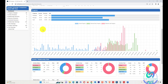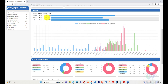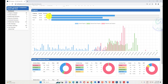Now I will look at the progress section to see what changes occurred between the two months. This is also useful for consultants to check what was achieved between the baseline and a recovery or revised schedule — you can compare your baseline versus recovery schedule changes. You can see here the schedule percent complete for current and previous; the difference was 1.6%, meaning 1.6% was planned during this duration.